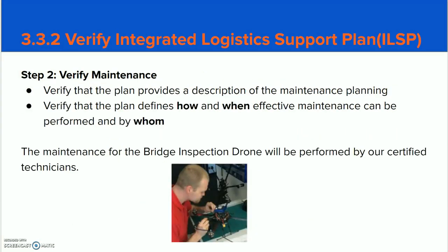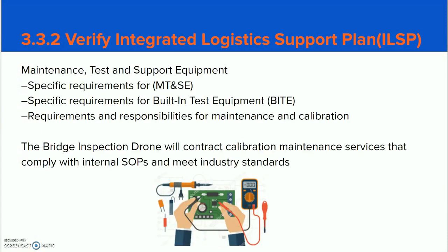Step 2. Verify maintenance. Verify that the maintenance plan provides a description of how, when, and by whom the maintenance will be performed. In our case, this will be performed by certified technicians. For maintenance, test, and support equipment, we will verify that the requirements for testing equipment, maintenance, and calibration are met. Our project will outsource these activities to calibration maintenance services that comply with industry standards.